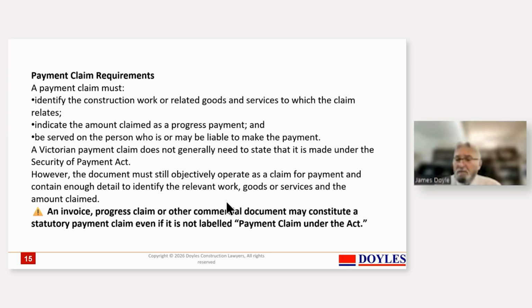So that's there. The other aspect is you should look at the contract. And if the contract says, well, you're only allowed to claim if your concrete's cured for more than 7 days, or has some other restriction in it, must satisfy the requirements of code number 457, then it's worth turning your mind to satisfying those minor obligations, such as getting an engineer to certify that it does accord with the code, and making sure that is presented to the principal in a way that will back up your payment claim.